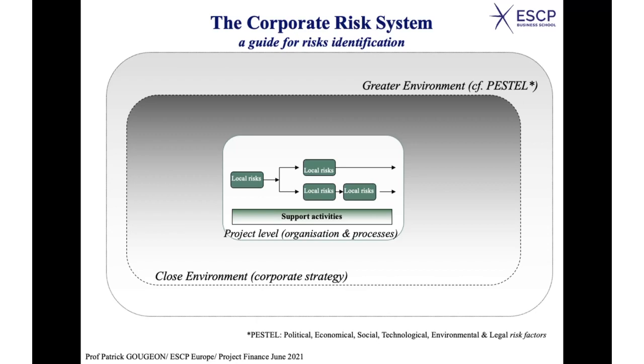You also have what we call organizational risk. You have different people working together, okay? You have to make sure that they are well coordinated. Accidents occur very often because two actions are taken independently without any coordination. And it may happen that these actions together are not compatible. And it might be the origin of an accident generating losses, or sometimes the interruption of the activity, which might be very costly for the project.